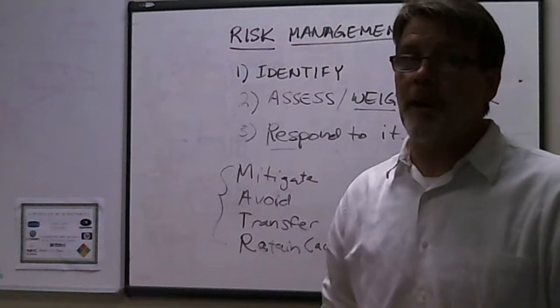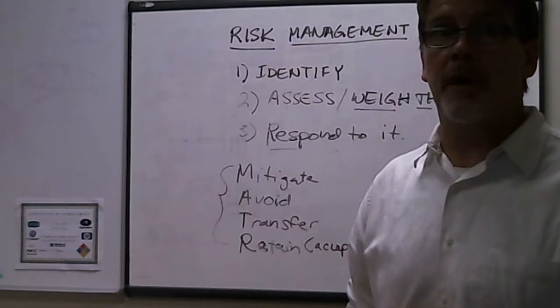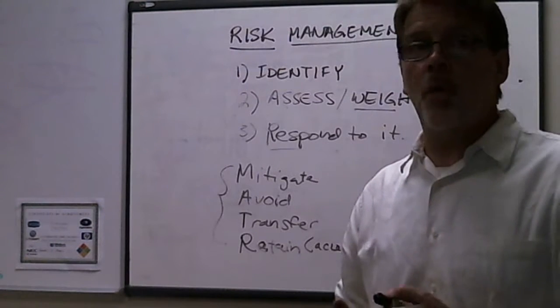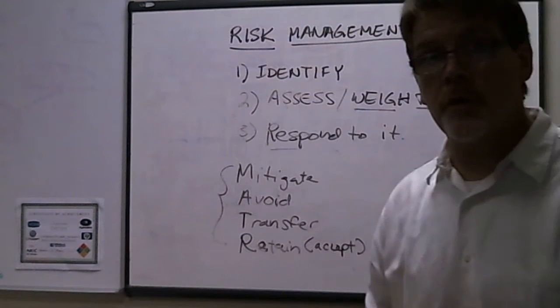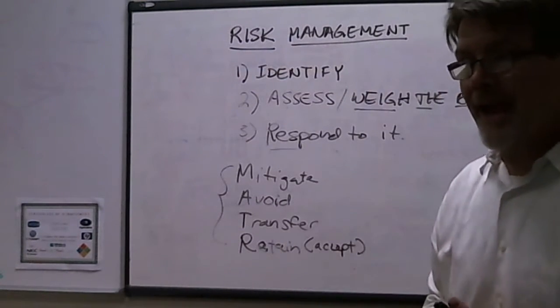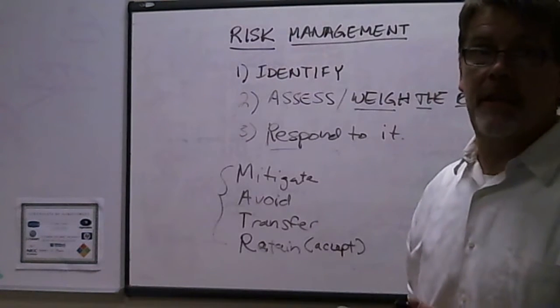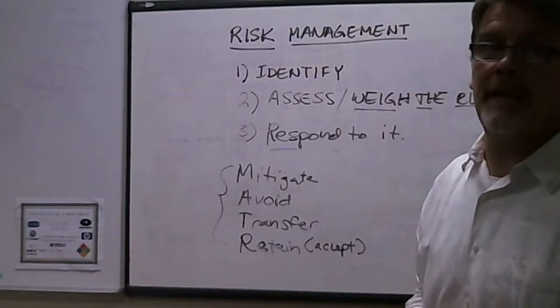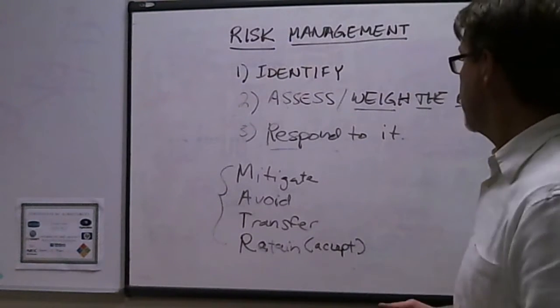Sometimes a risk response might generate and create some additional work for your project. And that's why you want to identify risk, because then you have to roll back to your work breakdown structure, and you're going to have to add that risk plan into that WBS. And there may be some costs associated with that. So that's another reason why we want to generate and evaluate risk.